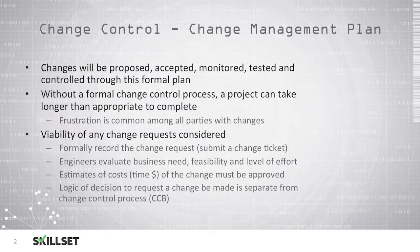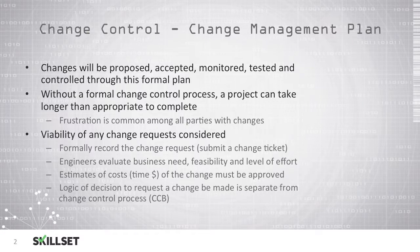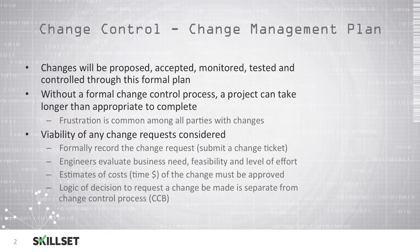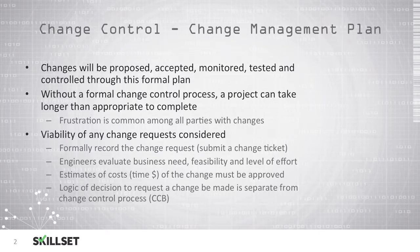The viability of any change request should be considered before the change is processed. You should formally record the change request by submitting a ticket. Engineers should evaluate the business need of the change, the feasibility of implementing it, and the level of effort that will be required. You should also estimate the costs, remembering that time equals money, before the changes can be approved. The logic of the decision to request a change should be separated from the change control process, and this is done by using a change control board, or CCB.